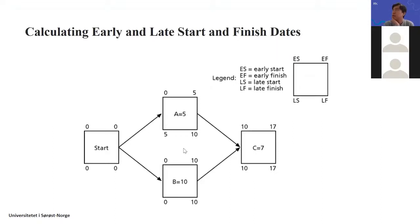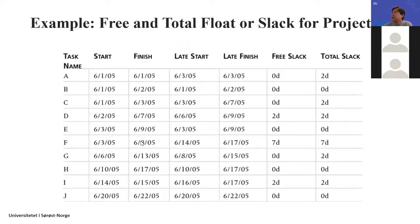As part of the critical path analysis, you can also draw a box for each activity with four corners representing early start, early finish, late start, and late finish. This shows the flexibility for each task. You can also view the free float and total float time available for each activity.